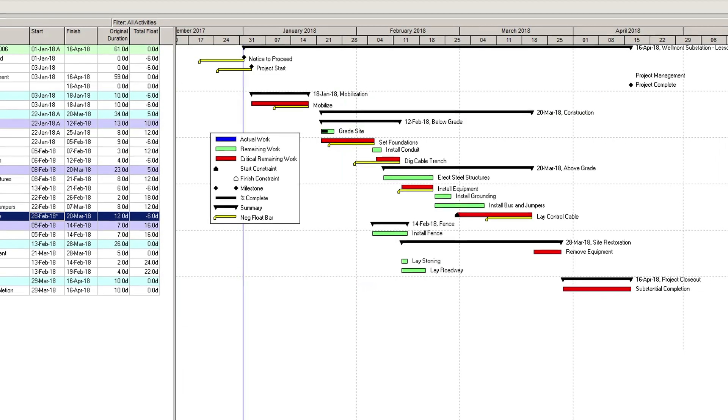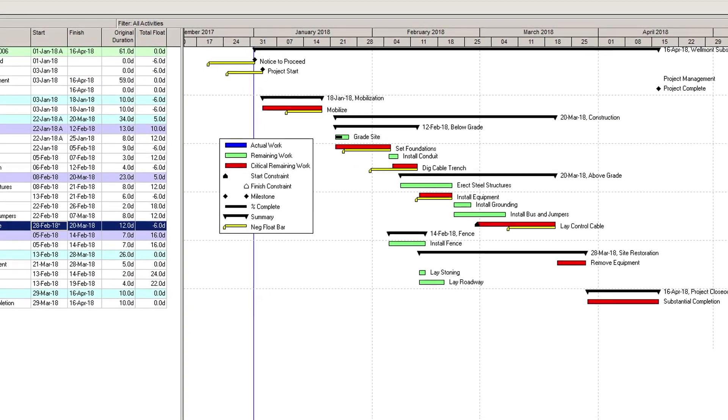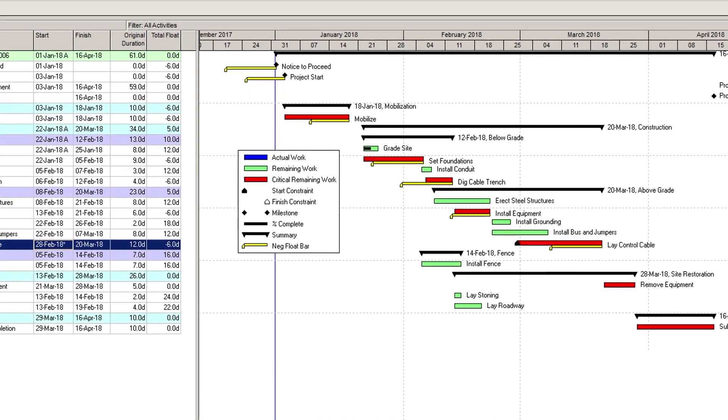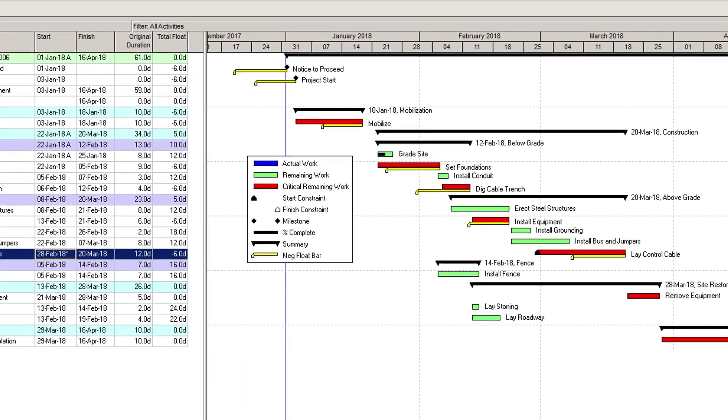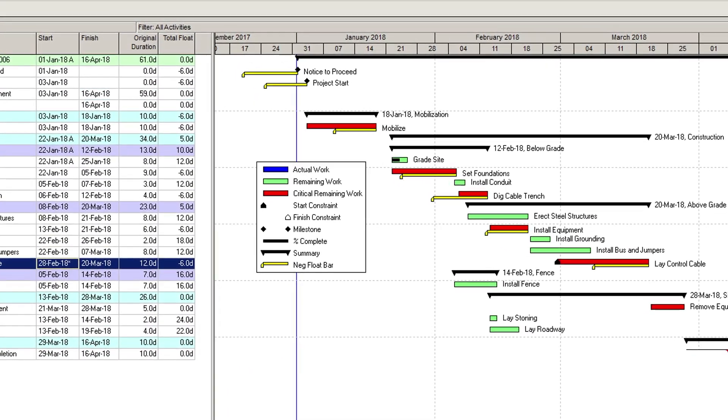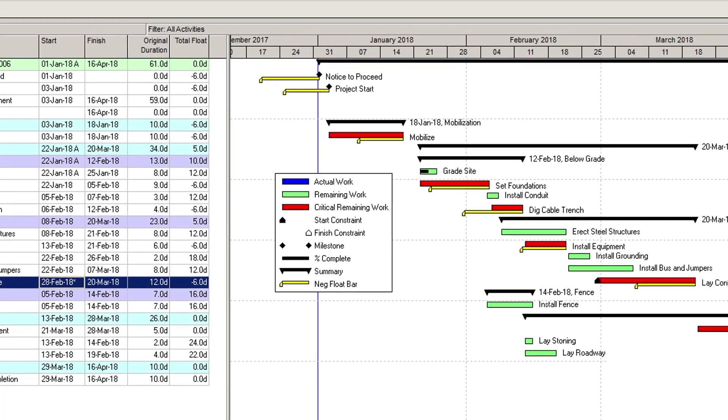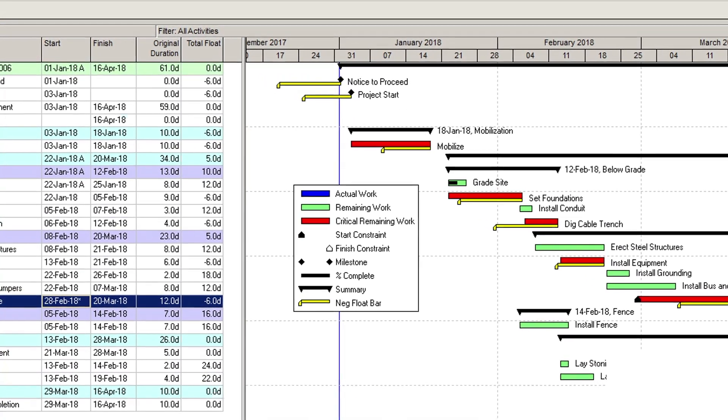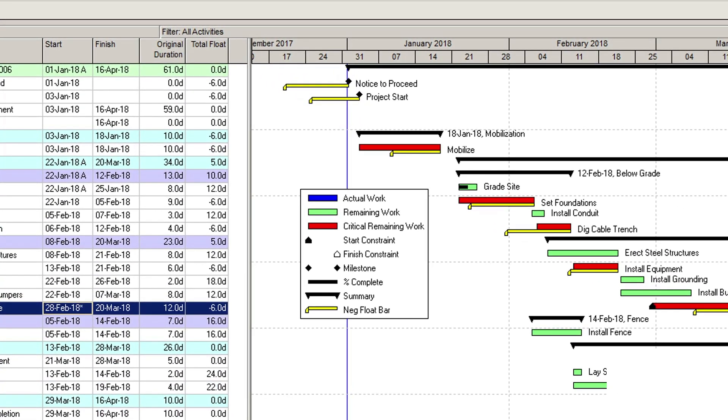Invalid dates should never be present in your baseline schedule. Many scheduling guidelines talk about this, and the DCMA will check schedules for this condition.